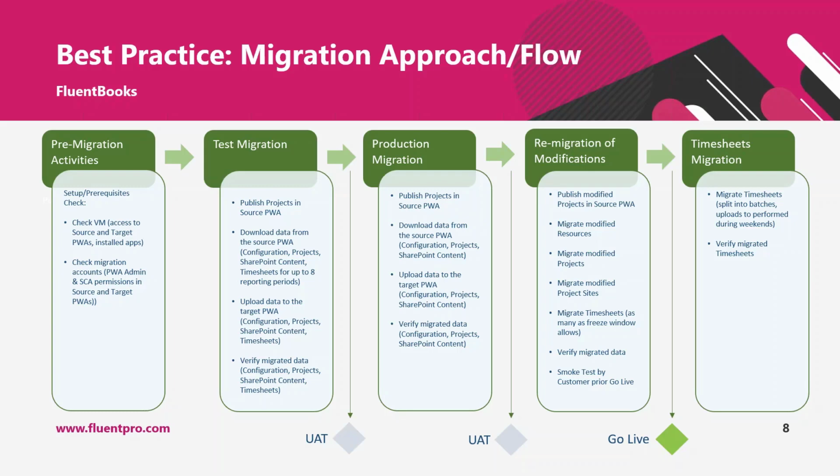After the upload is completed and verification is done by the engineer who is performing the migration, we also recommend performing a thorough UAT of the test project online environment and asking users with different roles to do this acceptance testing, to make sure that if there are any issues with Project Online PWA or with migrated data, this would be caught before the production migration starts.